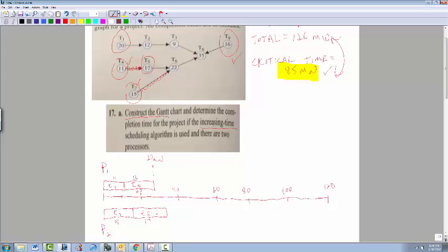So now task 5 is being done. In the middle of task 5 being done but not finished, task 9 is done. But that doesn't do a whole lot, because that doesn't mean task 8 is open, because it has those precedence requirements as well. So now the only task that is open, and sorry, I did T5, so I checked that off, done or working on. Doing these lines actually says that these tasks are done at the position that I'm at in this situation.